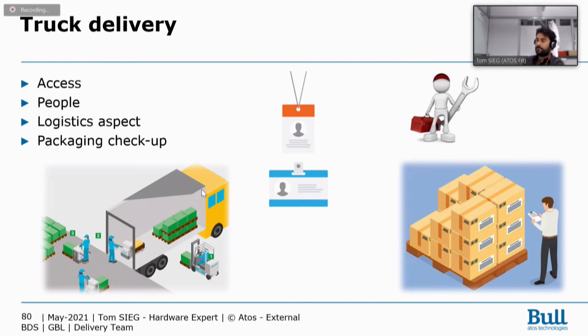So of course, you may have some damage on your package. You have to check if all your security protection on the package is okay, and if your material is damaged or not, because it's the only moment you will be able to do it. And it's the best moment, because if some components are broken, you have to ask for a new one and you will have a lead time. So it's the moment to check each packaging.